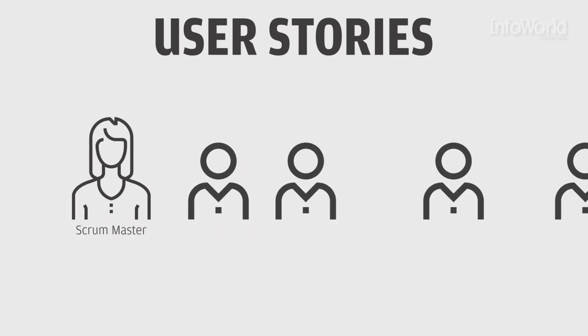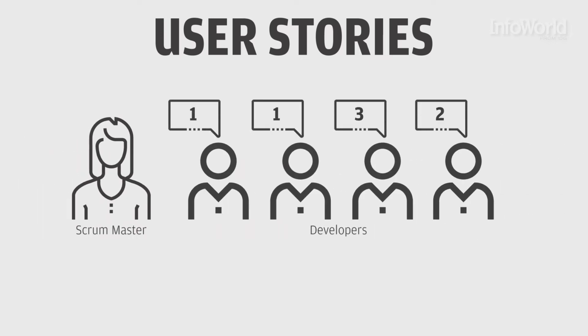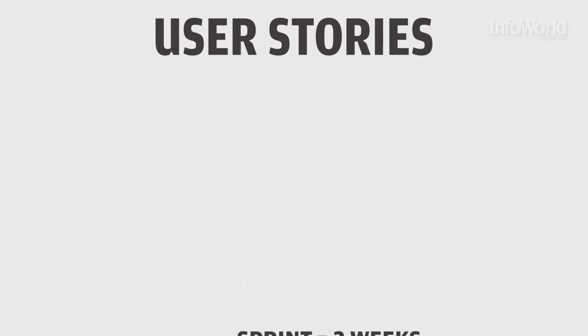When the developers meet in the kickoff Scrum meeting for a product, they can commit to how many user stories they believe they can get done in a sprint. For this organization, a sprint is 2 weeks long. In the Scrum, the team has the final say on how much work can be done in a sprint. Each developer commits to his or her part of the sprint.